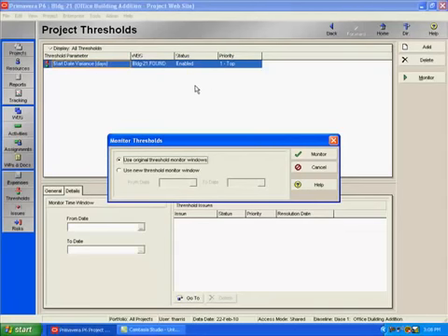For start and finish date thresholds, it's best to monitor the threshold after applying actuals but before scheduling. This will prevent numerous issues from being generated when only one activity causes the problem. If I schedule prior to monitoring the threshold, it would cause all successor activities to be included in the monitor that really are not an issue.